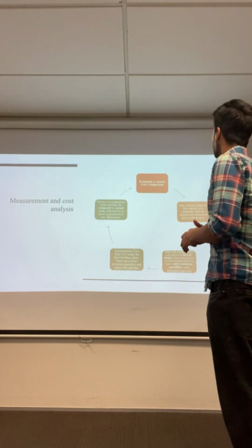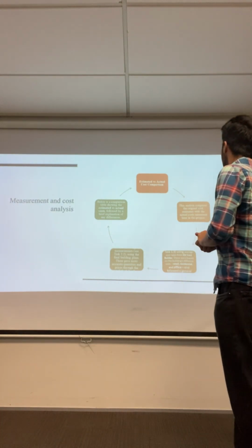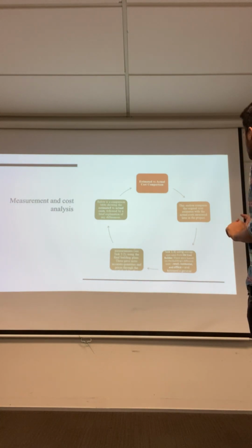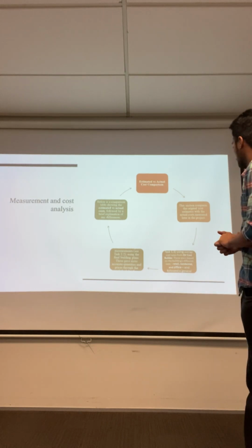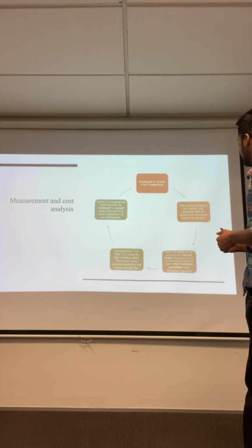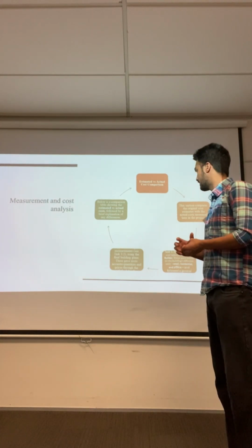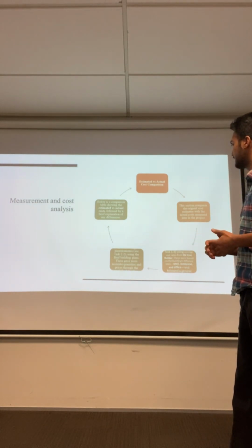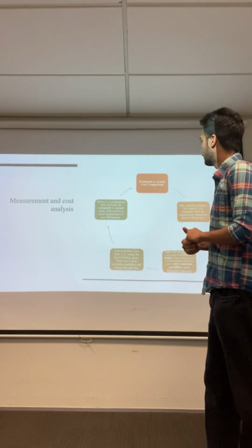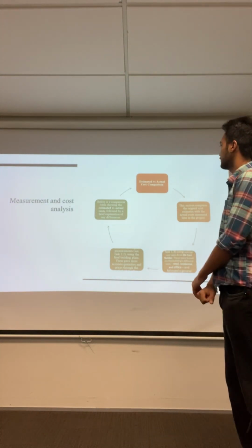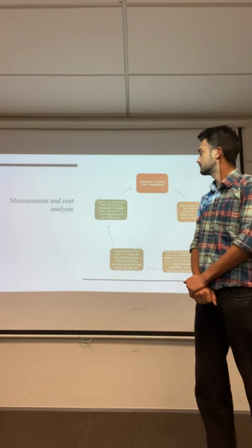The measurement and cost analysis. The first one is the estimated versus actual cost comparison. This section compares the original cost estimates with the actual costs measured later in the project. Task 3 is using average cost rates from QV Cost Builder. These were based on the building's different uses, retail, residential and office. Measurement task: using the final building plans, these gave more accurate quantities and prices throughout the building. Below is the comparison table showing the estimated versus actual cost, followed by a brief explanation of any differences. The next slide is